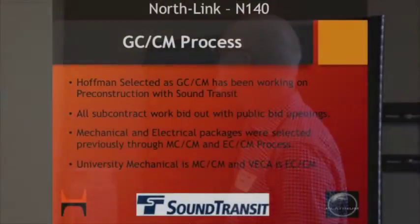It's not like a typical lump sum design-bid-build delivery, where subcontractors may furnish their scope letter to the general contractor, saying, this is what I'm going to provide to you. This is different. We tell you what you're going to provide to us. And you're not allowed to take exceptions, because then your bid would not be apples to apples with any other bids that we might receive. So very important nuance with GCCM.